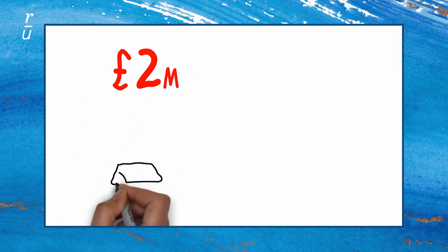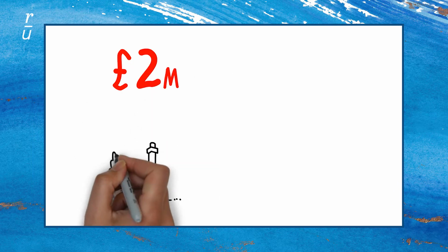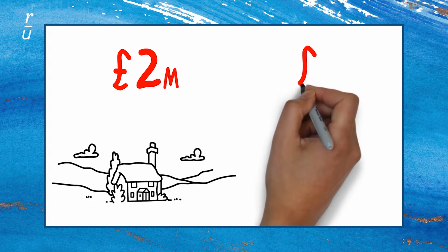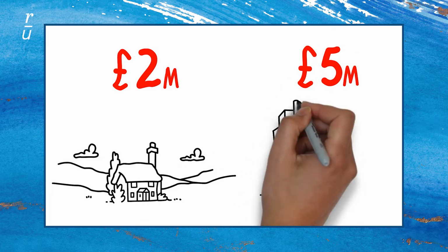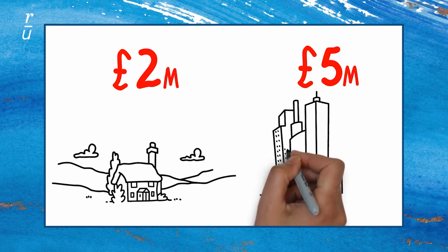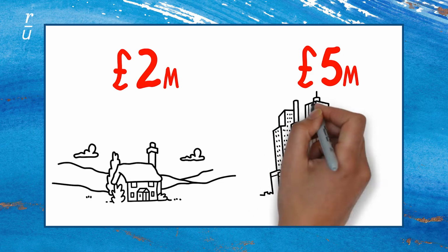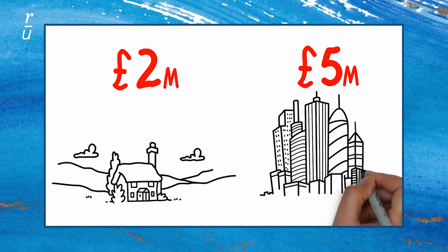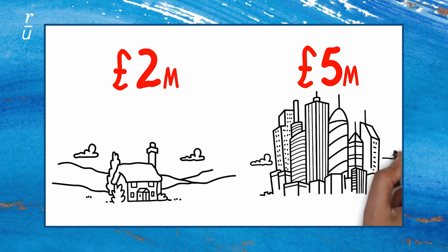Property owner's liability normally limits at £2 million for rural projects and £5 million with urban projects, but it can go higher. It stands to reason that the opportunity for claims is increased when your project is surrounded by more people, so the indemnity limits should be higher.